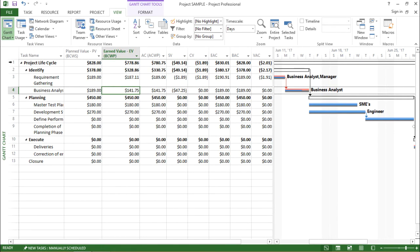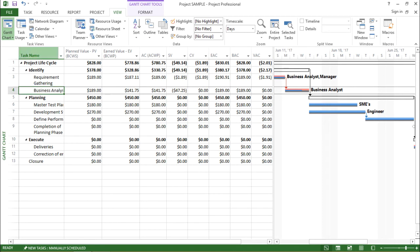Now you see the layout of my table has changed. Now let's try to analyze what has happened. So I'll go to task ID 4 that is business analysis. The planned value for this particular task is $189. Now if I go to the earned value, you see there is a difference.